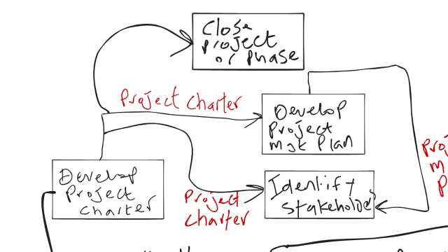Because right from the get-go, if you did this right, you should have specified in your project charter the key criteria for project success. And if you had defined that up front, well, at the end of the project, you need to check into it. So there is a reason why the PMI lists things like your project charter as an input to something in closing. All the way down in closing, all the way on the other end of the spectrum, we have our project charter going in because it's relevant. So again, let's look at the landscape.